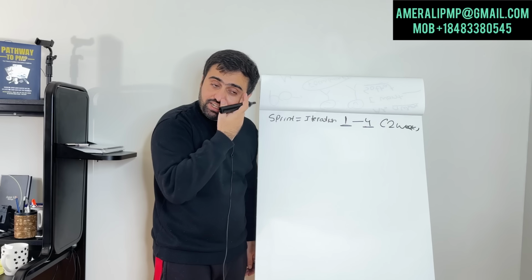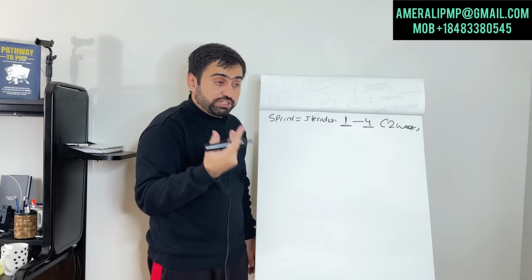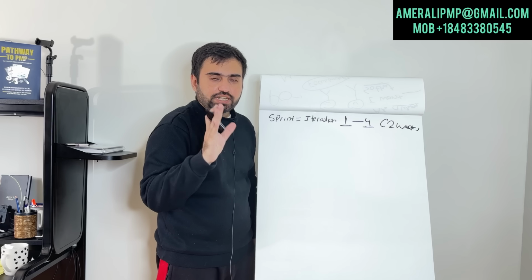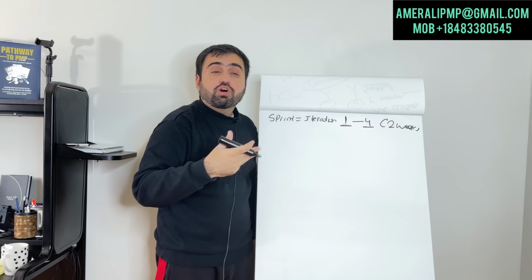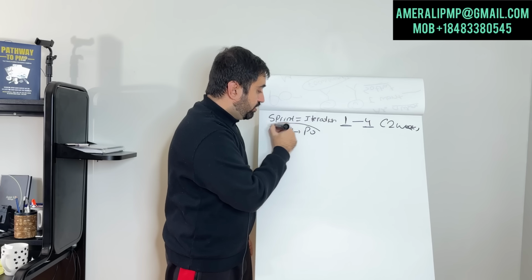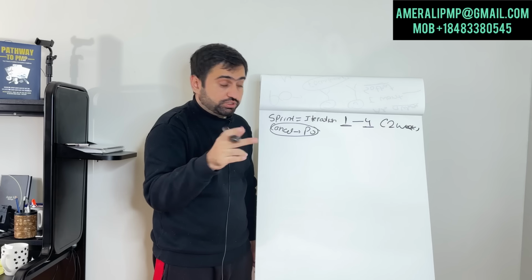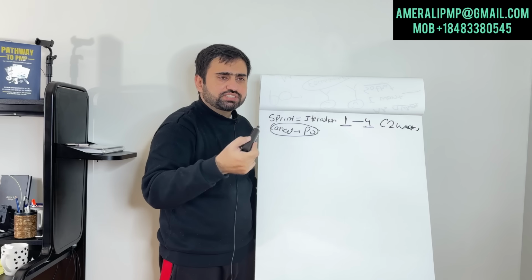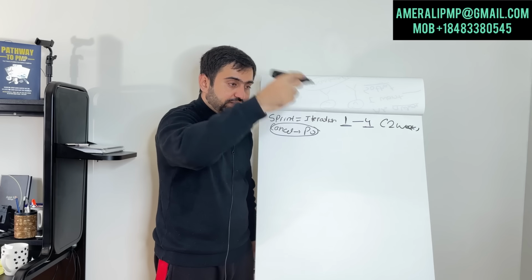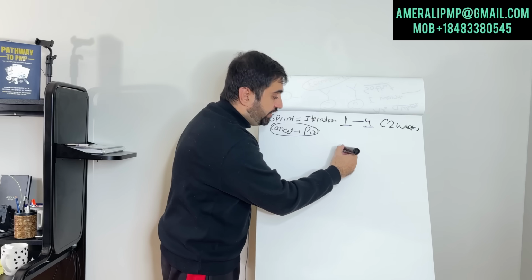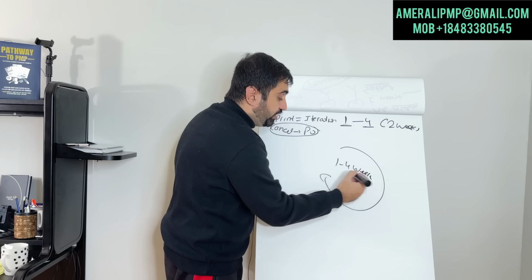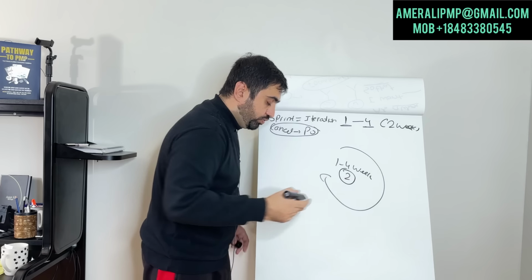A product owner will decide how long the sprint should be. Normally with consensus, once the length is decided, we don't change the length of the sprint. If you want to cancel the sprint, only the product owner can do it. No Scrum Master, no sponsor; product owner has the authority. Maybe the sponsor says it to him, but it's the responsibility of the product owner. So a sprint is 1 to 4 weeks, the entire duration in which the work actually happens. Okay, 1 to 4 weeks. We are going to say it's 2 weeks. We are taking the 2 weeks.